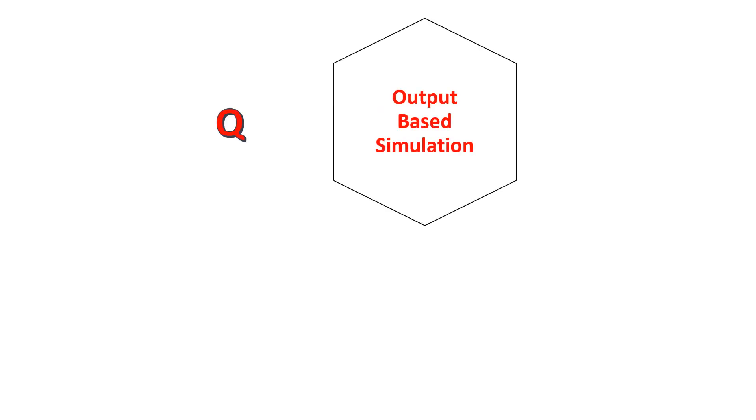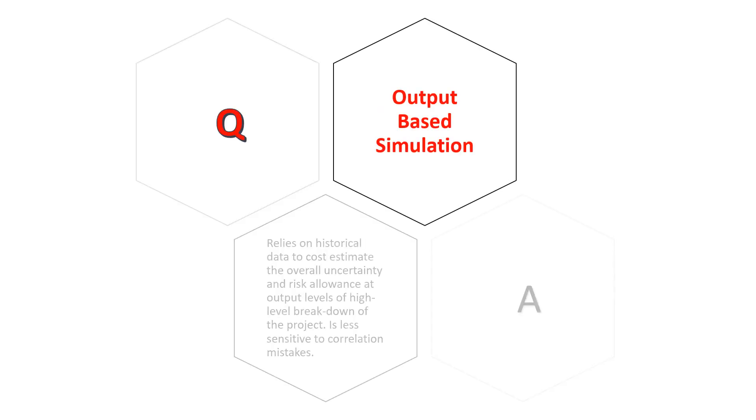Output based simulation: Relies on historical data to cost estimate the overall uncertainty and risk allowance at output levels of high level breakdown of the project. Is less sensitive to correlation mistakes.